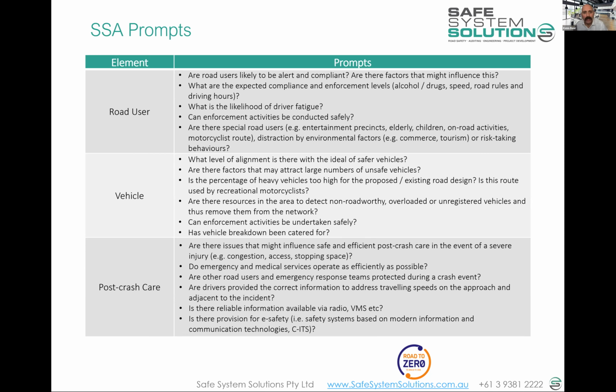The project team was able to do some tweaks to their design, alterations to the barrier, open it up, and they were able to create basically a purpose-built facility for enforcement activities, all within the scope of their project. It really didn't cost them anything more in a $103 million project. There was basically no more cost, and a wonderful facility now that the road is enforceable as well.